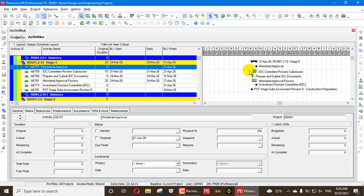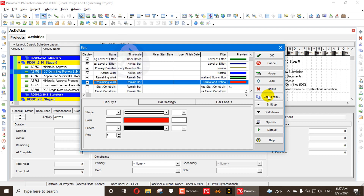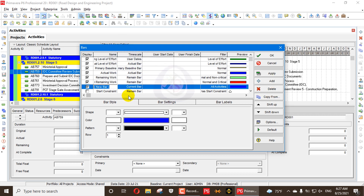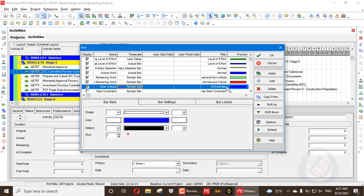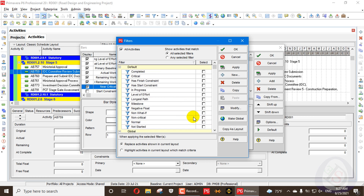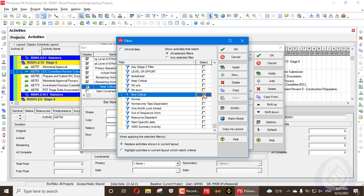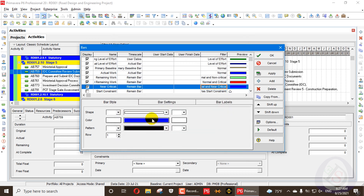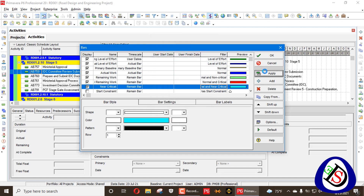These activities shown in a green color — we can go here in the bars and add a new bar type with the name 'near critical.' The bar type should be set to 'remaining.' Under the remaining bar, we apply a filter — select the normal filter, then go here and apply the near critical filter. This is non-critical and this is near critical. Press OK.